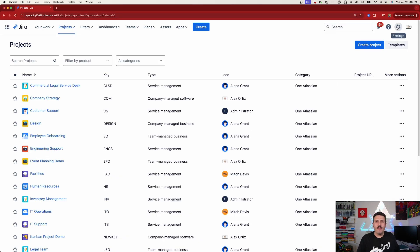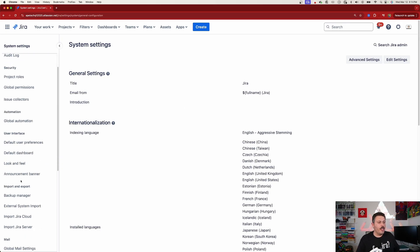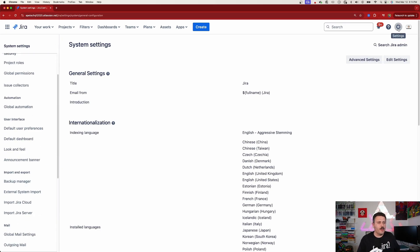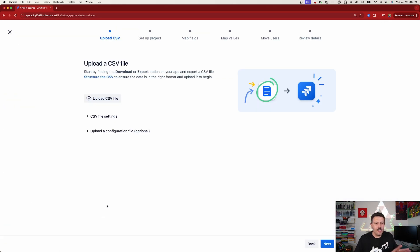There are two different ways to do this. I'm going to show you the new and improved way first, then prove that the old way also works. Go to the gear in the top right corner, click on System, then go to External System Import, and select CSV. This is the new importer and it works really well. The only caveat is that this method is going to force you to create a new project.